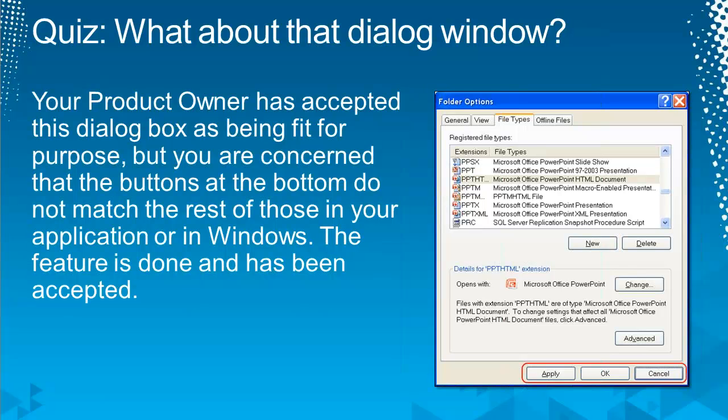So a mature team wouldn't just go fix this at the next opportunity. They would bring it up, put it in the backlog. The product owner would own that, prioritize it. Granted, the effort would be like a half a point. It's just go in there and switch some things around. But would it? Is it going to break any UI tests that are looking for those buttons in certain places? Is it going to break your training videos that the guys down the hall created? Is it going to break your documentation, arrows pointing at buttons, and now that's got to be done? So it may not be as quick a fix as you think.